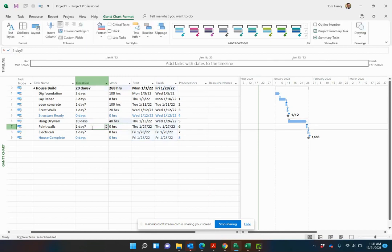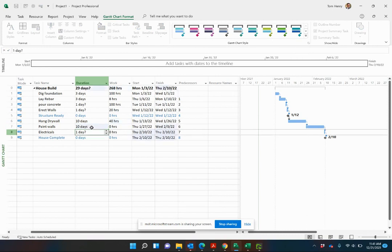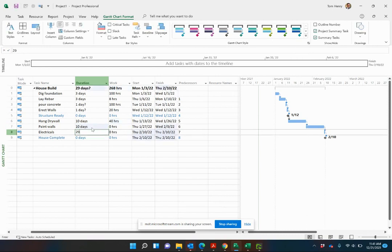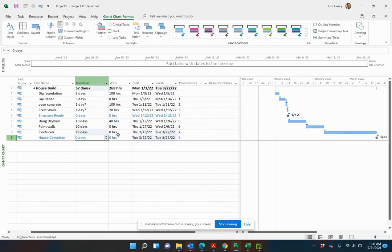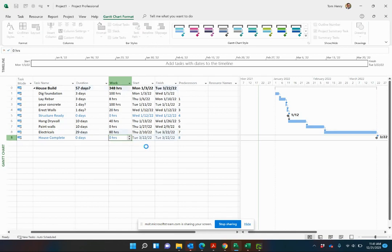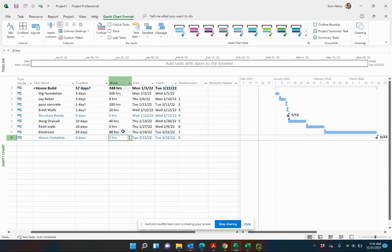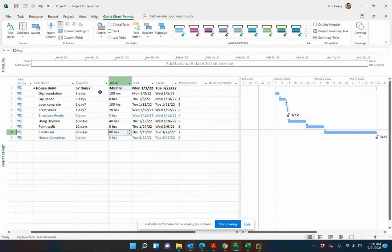As you can see, we can quickly come in and add these. Electrical takes 29 days. Maybe they're just coming in off and on, waiting for other people to do their work in between, but it's only roughly 80 hours working part-time on that generally. So there we go. We've got the duration and the work estimated.